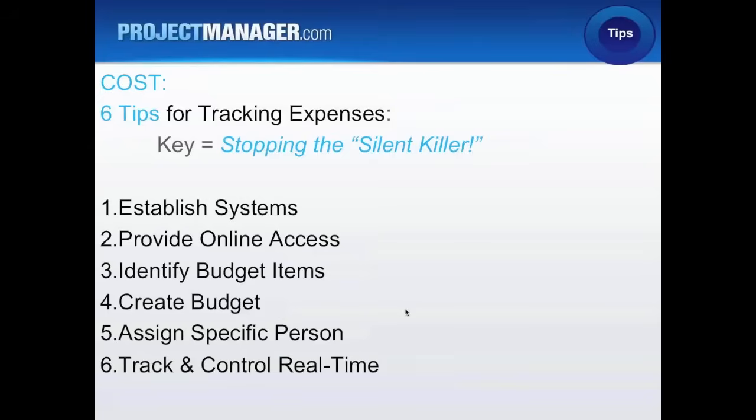So there is rigor there that needs to be done, and also with that is blocking out time for the person's vacation, talking to the resource, knowing how much time you have available. They may be split up among 4 projects, but I used to have a resource who would take a month off in the summer for their children's school break. And so I would have to know to block that person out in the whole month of July.